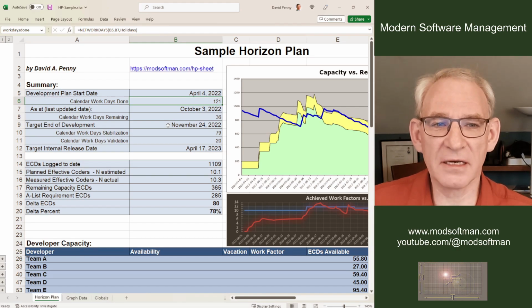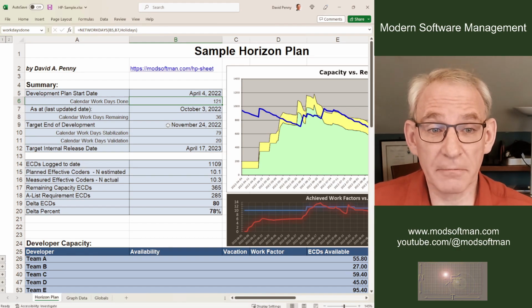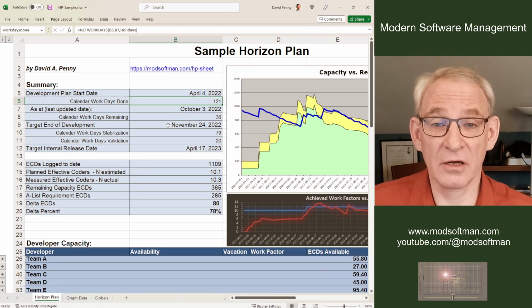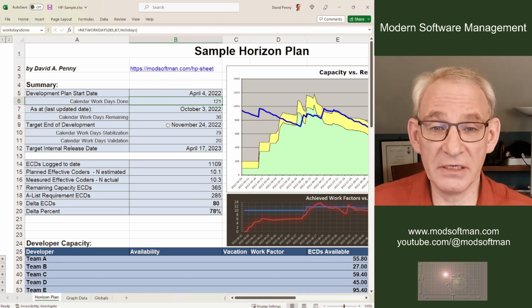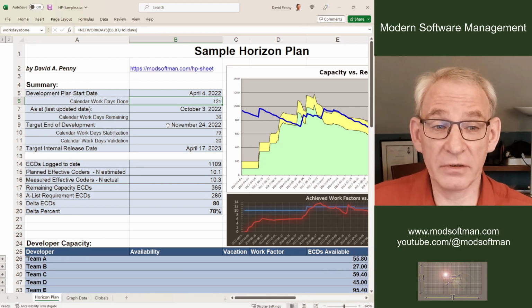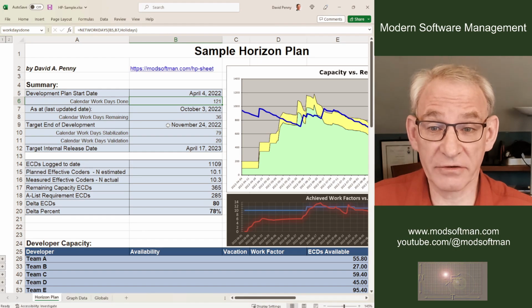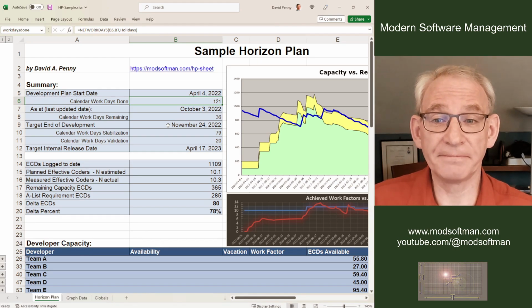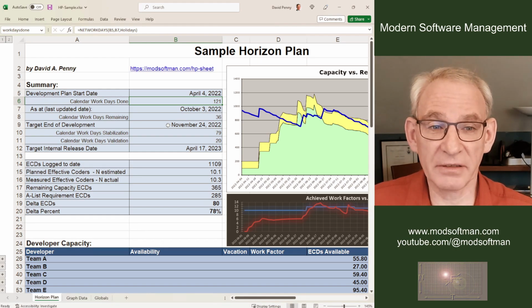And what does done mean? Done means that you've coded the feature completely, you've coded all your error cases, you've coded any monitoring software that you need to go along with that, you've coded any deployment software, you've coded any automated regression tests that you're going to be adding. You're basically done. Done and dusted, and probably demoed it as well.